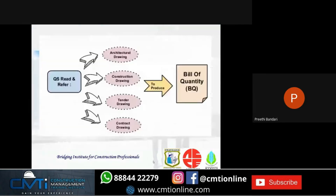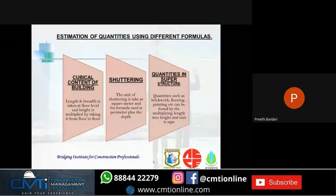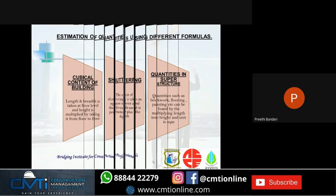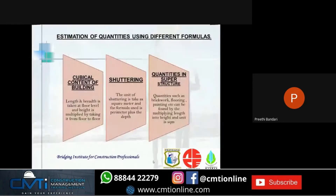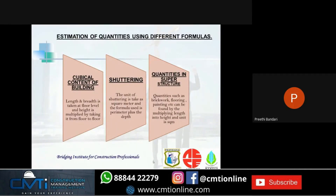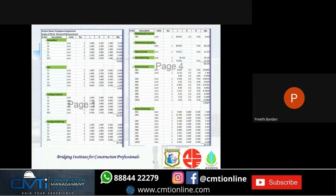The QS uses all the architecture, construction drawing, tender drawing, and contract drawing to produce the bill of quantities. Before the bill of quantities is made, there is estimation of quantities — a summary is made. For excavation and PCC footing, you take length, breadth, and the floor height; this is measured in cubic meters. In case of shuttering, you take the area of the place and the formula uses the perimeter plus the depth. When taking quantities in the superstructure — that is, brickwork, flooring, painting, which are the architectural details — you take length by height, that is the area of the building. This is one of the examples I've done.